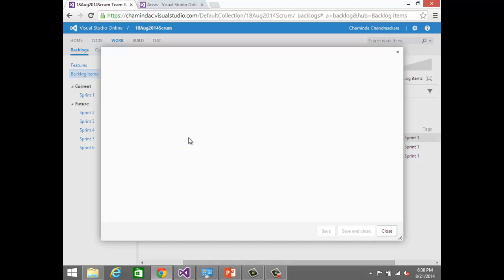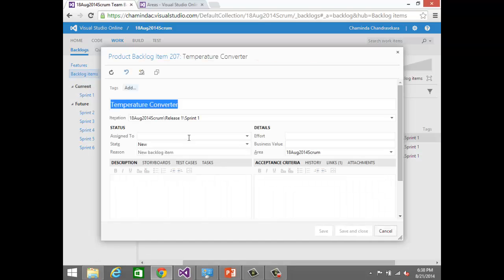Now when you are doing relative estimations, there is a way to put that. In the Scrum template, the place to put that is effort. Now most people use this effort as hours. That is totally wrong. So whenever you are advising somebody who is using the Scrum template, ask them not to put hours or minutes here. This should be a relative measurement. You can have your own scale, maybe t-shirt sizes like XXL, large, or a number from 1 to 100 or 1 to 10, whatever the scale, just put a relative number.